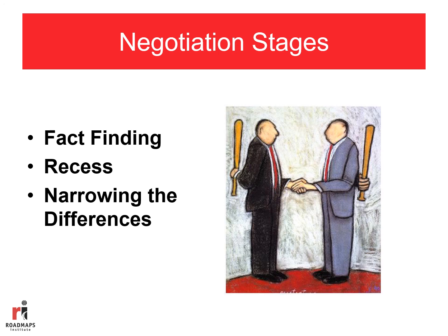If agreement cannot be reached on an issue, though, the negotiator moves on to the next issue. Usually you want to try to get agreement on things that you're going to get yeses out of, and then leave the hardest negotiations to the very end. But suppose that we don't actually achieve agreement in narrowing the differences for all the different aspects of the particular project. Well, maybe you can modify that project and reduce its scope such that everybody will be happy.